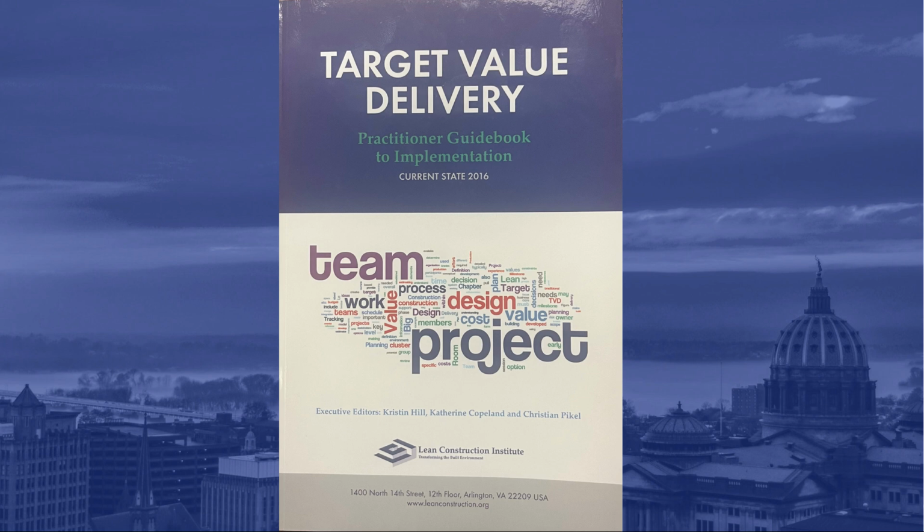One practice you can utilize on a project to promote a more integrated design approach is Target Value Delivery, TVD, as promoted by the Lean Construction Institute, LCI. TVD is a disciplined management practice to be used throughout the project to assure the facility meets the operational needs and values of the users, is delivered within the allowable budget, and promotes innovation throughout the process to increase value and eliminate waste. For the purpose of this video, I will highlight some of the key TVD concepts as I share an example of TVD application on a project at Penn State.